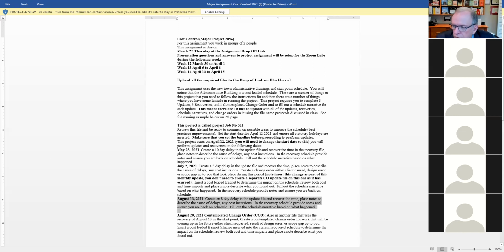I'm going to tell everybody: when you create the delays, as soon as you do it, figure out why the delay happened and put in a note. That's going to make it so much easier to fill out the schedule narrative. Afterwards, you just look at your notes when you're doing the narrative, and it's not that hard. Otherwise, you'll be looking at it thinking, what happened here? Why did I do this? Notes are very helpful that way. It saves you time and doesn't make extra work when you fill out the narrative.